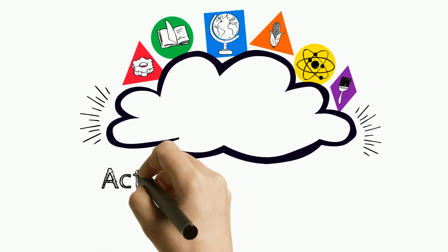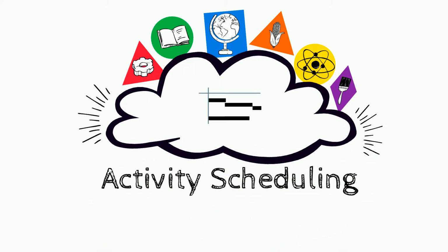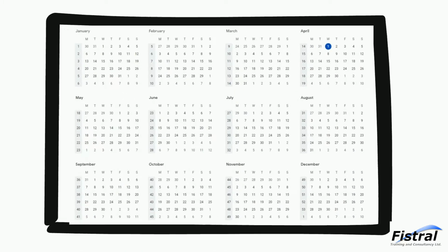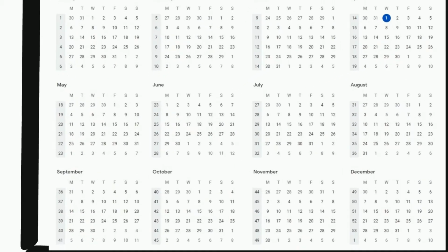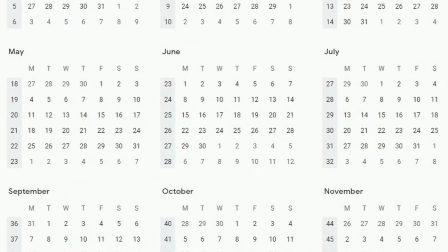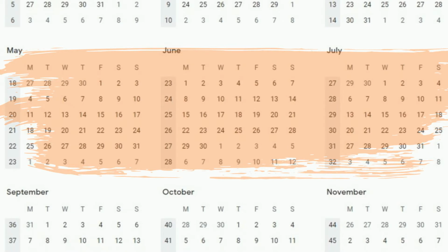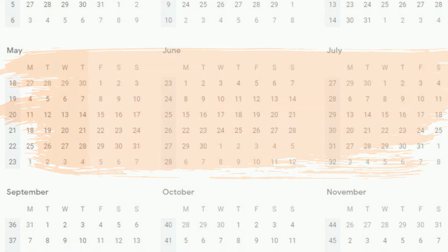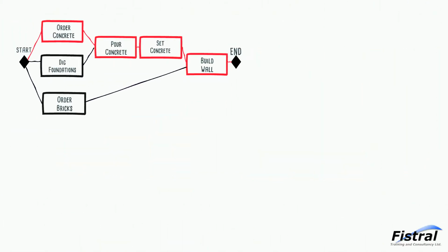Eventually, and only after doing everything that we've covered in all of the other sections, we begin to think about scheduling our work. Once again, we can do this for an entire project at a fairly high level, but it's probably more useful and accurate for a smaller subsection or phase, maybe the next 3 months, for example. Our network diagrams have given us the order that the tasks could be done in and tell us a potential minimum duration of the project.